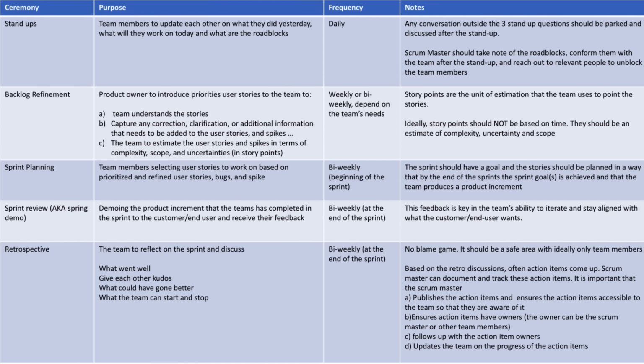The Scrum Master should make sure that this happens. Moreover, the Scrum Master should take note of the roadblocks, confirm them with the team after the stand-up, and reach out to relevant people to unblock the team members.